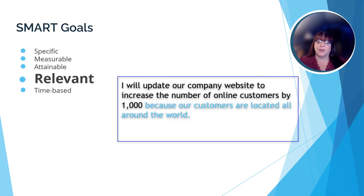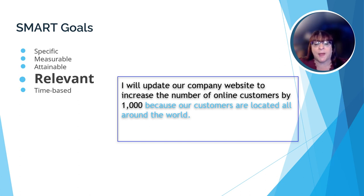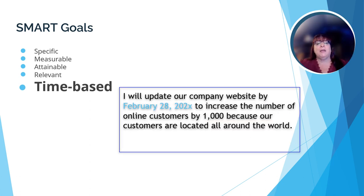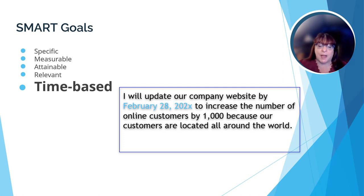R is for relevant — we want to align our goals with what is important to our organization. For example, 'I will update our company website to increase the number of online customers by 1,000 because our customers are located all around the world.' Finally, T is for time-based, meaning there's a reasonable amount of time. For example, 'I will update our company website by February 28 to increase the number of online customers by 1,000 because our customers are located all around the world.'